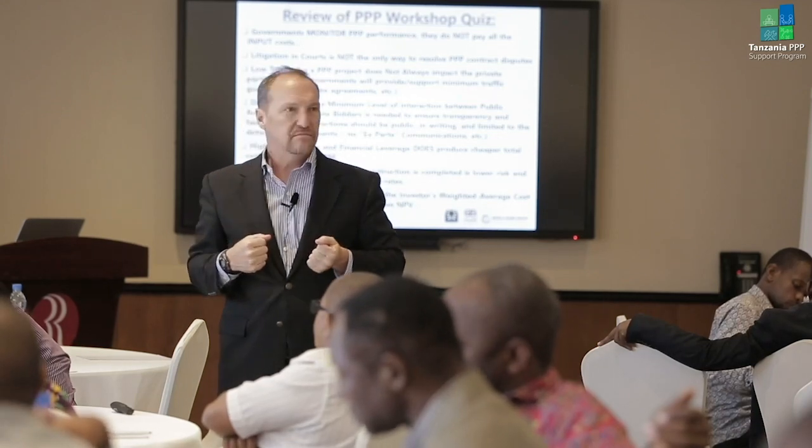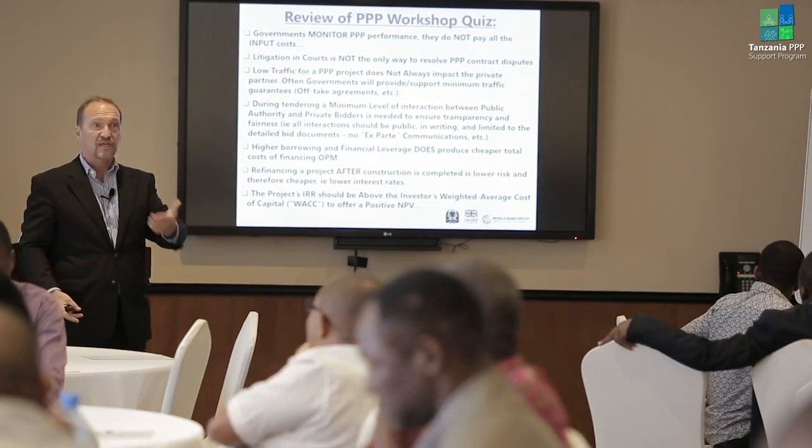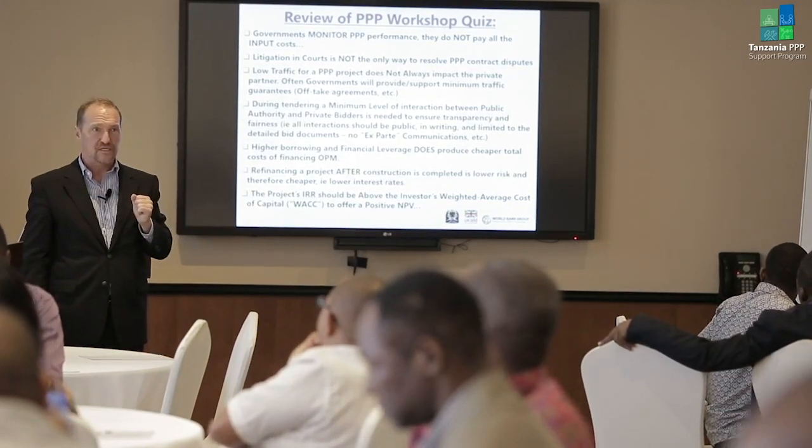And lenders, investors would say, the construction is finished, so the risk is lower, so our interest rates will be lower. So that is something that happens. I want you to just understand that here. Refinancing a project after construction is completed is lower risk, therefore offering lower interest rates. Yeah?